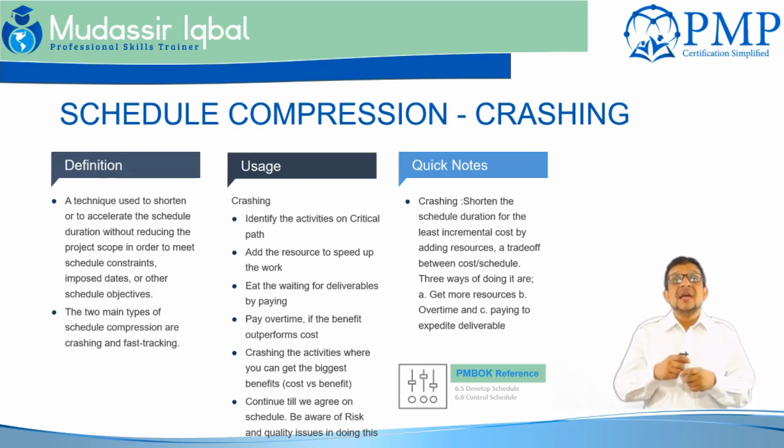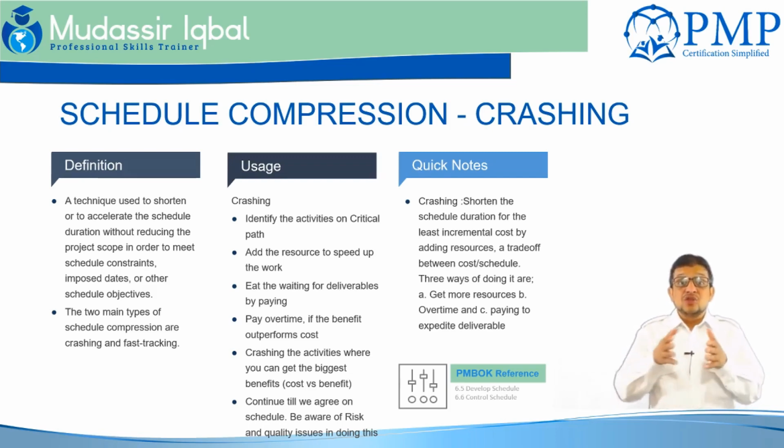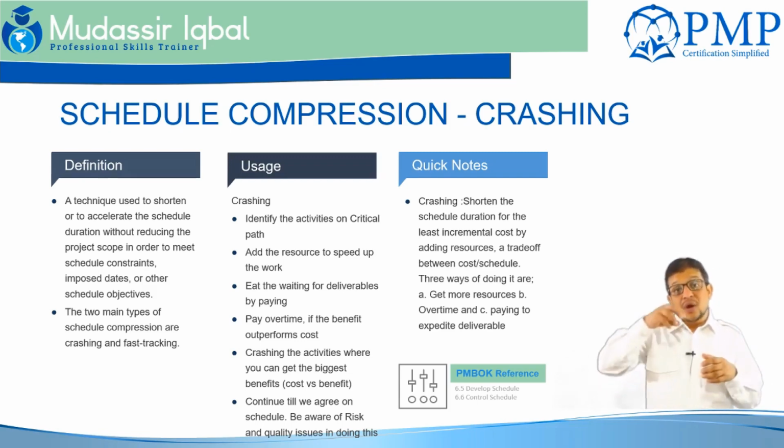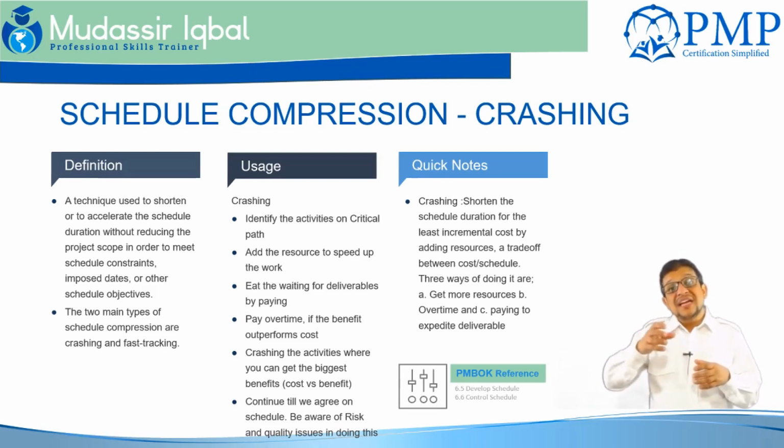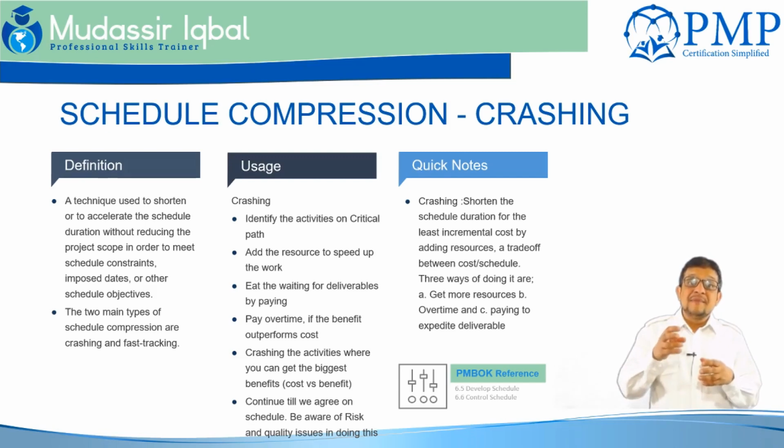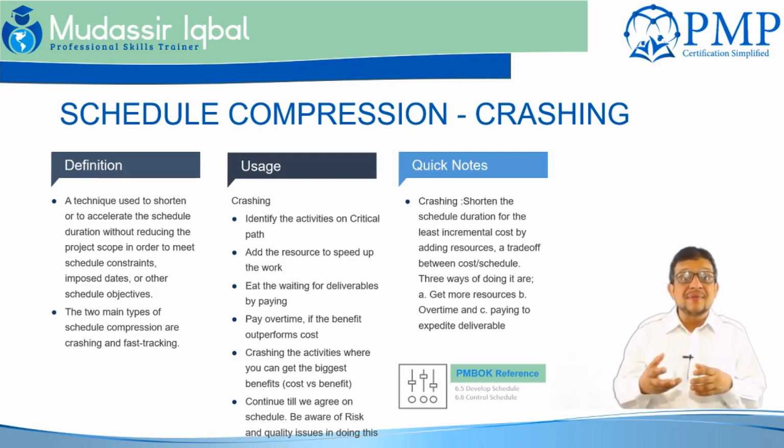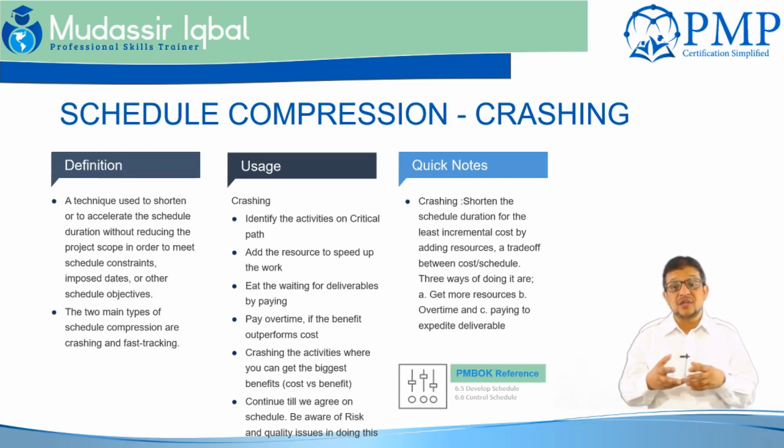And obviously, when we are working on critical path activities, we might not be able to crash all activities. So again, it's a schedule analysis that you look at to understand which activity can be shortened or optimized with additional resources. You may not get the same results in all activities when you add resources. So you put additional resources in to shorten the activity's duration. In other words, you are looking for ways to shorten the schedule by applying more resources.